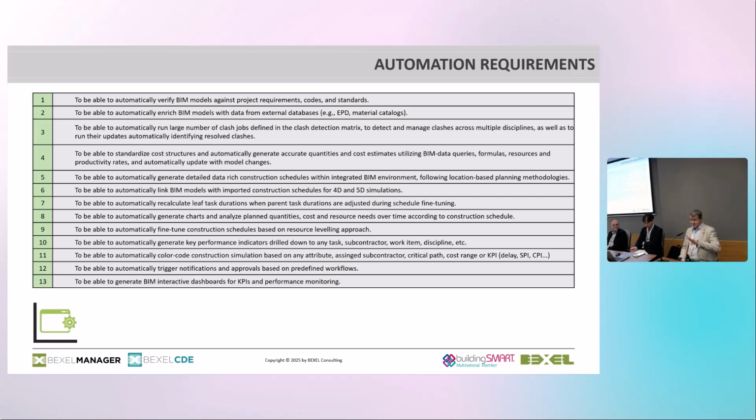In Microsoft Project, yes. But am I going to do that? I saw around 5 to 10,000 schedules in my life. Never saw quantities in Primavera at a desired detail level, because it's manual work. And changes are the only constant thing we have in the project. So without automation, when we are not able to automatically create a lot of information, we are not going to be successful.